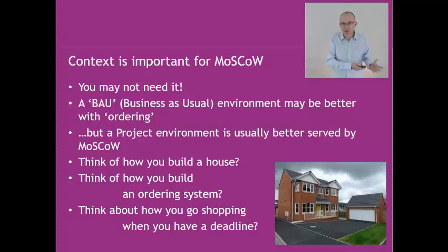But if you're over by the vegetables and you're running a bit late, you need to move on when you've got, if you like, your musts and shoulds. So this MoSCoW system works on the basis that there's dependencies. So in a physical layout of a shopping centre, you need to go to the vegetables, go to the cheese area, go to the fizzy drinks area. These are a long way apart. You don't want to visit these things 3 times because you're doing all the musts first.